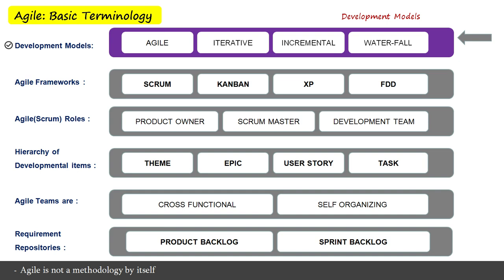Iteration means doing something repeatedly, and iteration allows for repeating all software development activities again and again in each iteration or development cycle. We can apply this approach in a complex design process because we rarely achieve the intended goal in the first attempt itself. So we proceed on an incremental basis. The iterative model is useful when the requirements of the project undergo frequent changes.